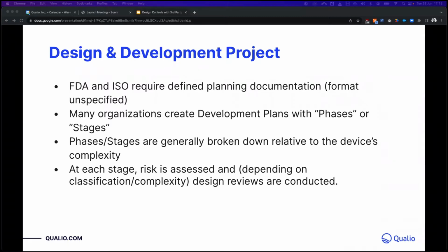So there are several ways to plan or several methodologies to follow. Each offers a series of gate stages or phases. At the end of each phase, you'll have a checklist to run through to review what you've set out to do and what you've completed. The standard does not prescribe a specific lifecycle model. The users are responsible for selecting a lifecycle model for the software project that maps the relevant processes and activities to the relevant standard.